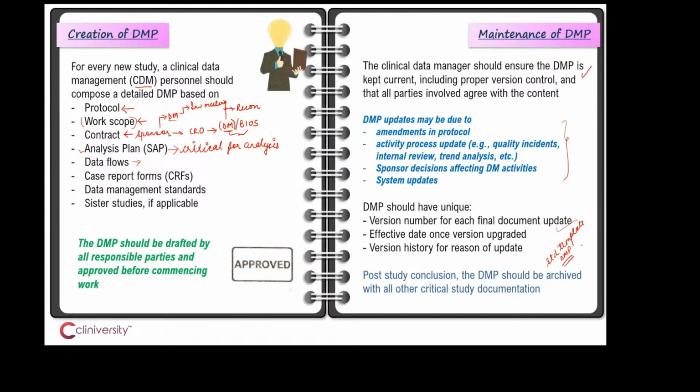And while their study was ongoing, the organization upgraded their template too. So the current DMP template has upgraded. Now, again, the study is going to go on for another 2 years. So the decision whether they want to stick to the existing template that they have used in their study, or should they adopt the newer version of template that has been created by the organization, that decision, again, the SOPs and the guidance documents of the organization should let the team know.